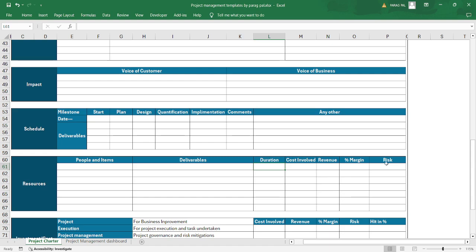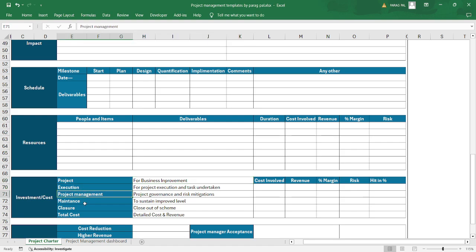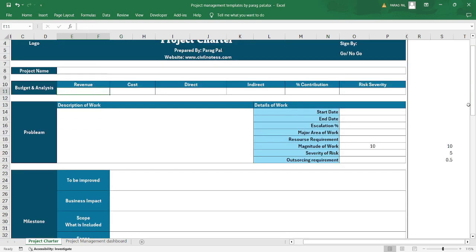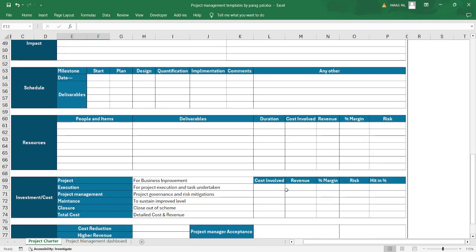In the investment and cost section, you define cost, revenue, percentage margin, risk, and the overhead percentage for business involvement. You distribute the total revenue across execution, project management, maintenance, and closure phases. Management can then understand how much cost goes to business improvement, project execution, governance, and whether project management is sustainable.